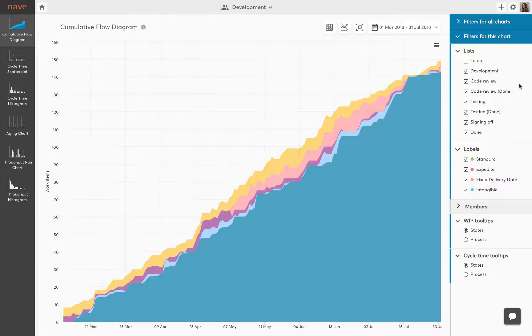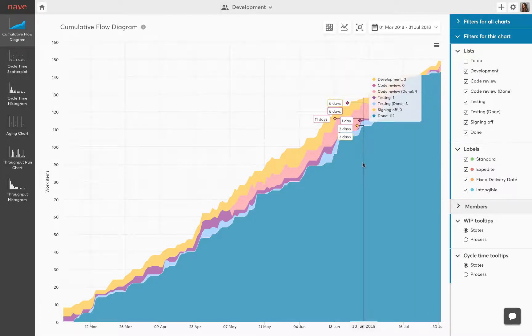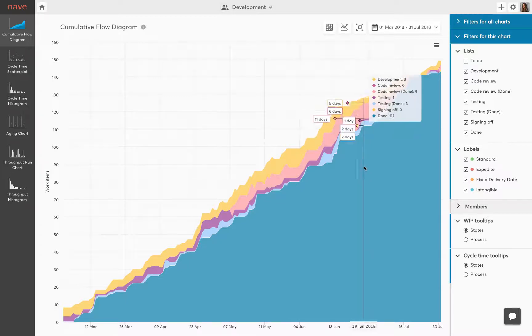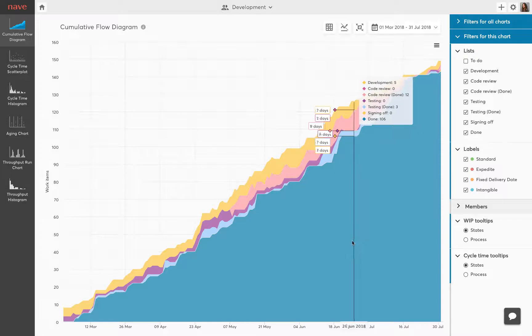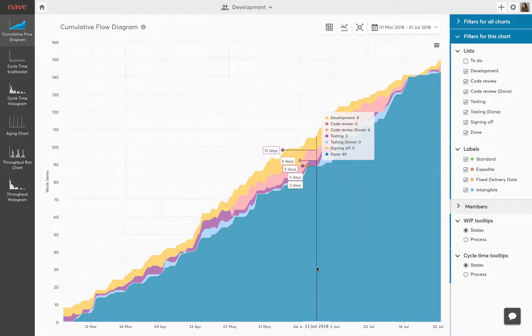So how do you know how much is in progress and how much is actually being done? The cumulative flow diagram provides an overview of the current state of your process by tracking the total number of tasks in progress each day. The vertical axis shows the number of tasks while the horizontal axis plots your timeline.